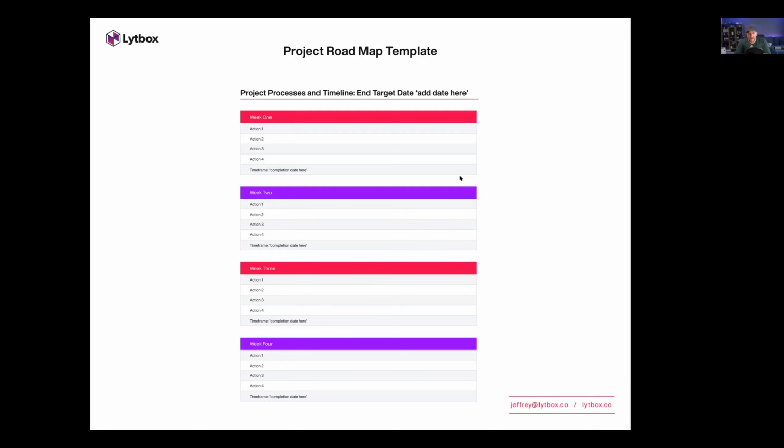At first I didn't do it. I just said the project would take, you know, 3 to 4 weeks. That was it. But then I learned to get more detailed in our contracts and put down a timeline like this that's detailed. What we're going to do per week. What are we going to do in the strategy and research phase? What do we do in the design phase? And you put something together like this.